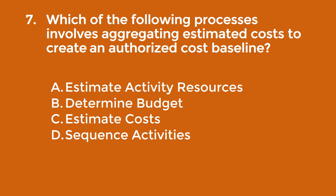Question seven: which of the following processes involves aggregating estimated costs to create an authorized cost baseline? The correct answer is B — determine budget. The estimate costs process is used when approximating activity costs. We then aggregate those costs and create an authorized cost baseline in the determine budget process.